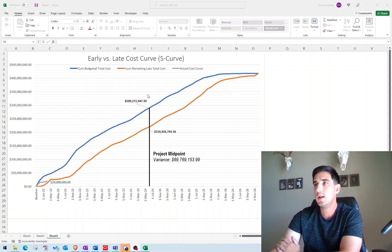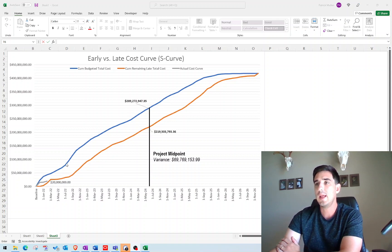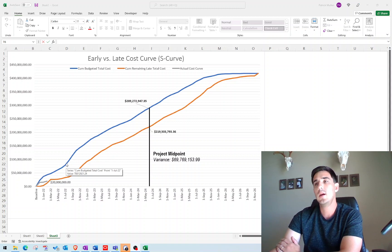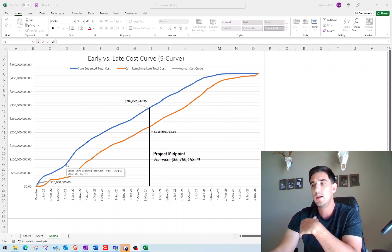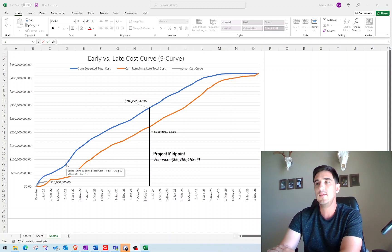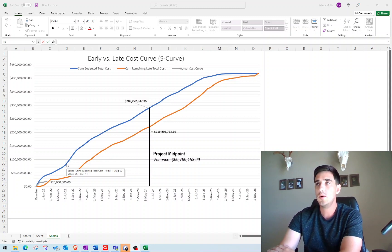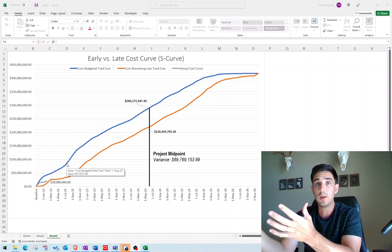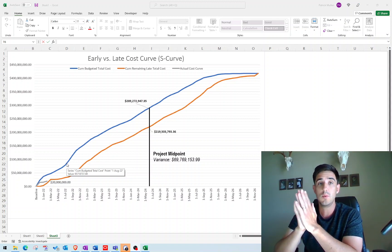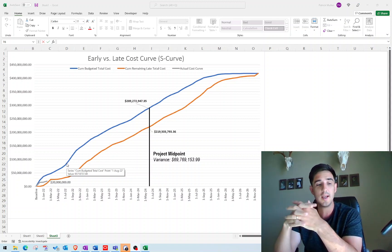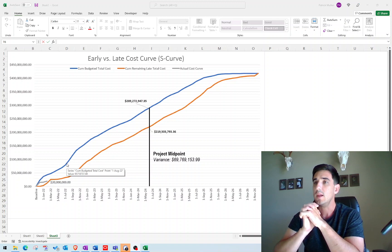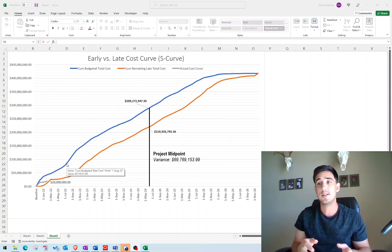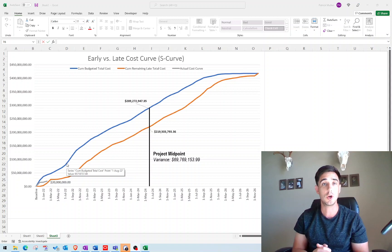Let me just explain a little bit about cost curve. What this is showing is the blue line represents the planned spend on your project per month based on how the activities are currently scheduled to occur. Also known as the early curve, it's just in your schedule, once you press that F9 schedule button, this is simply how the activities are scheduled to make progress according to your current plan.